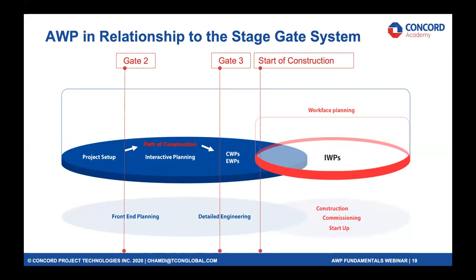Advanced work packaging really works — the 'advanced' part works — when, at least in stage three during FEED, you start building your path of construction. Your path of construction is your plan and your breakdown of areas with full buy-in, including operations. We receive many requests where people say they want to implement AWP but have already started detailed engineering — that's too late. It's really important to start the AWP system in phase three, where you start delivering the path of construction.